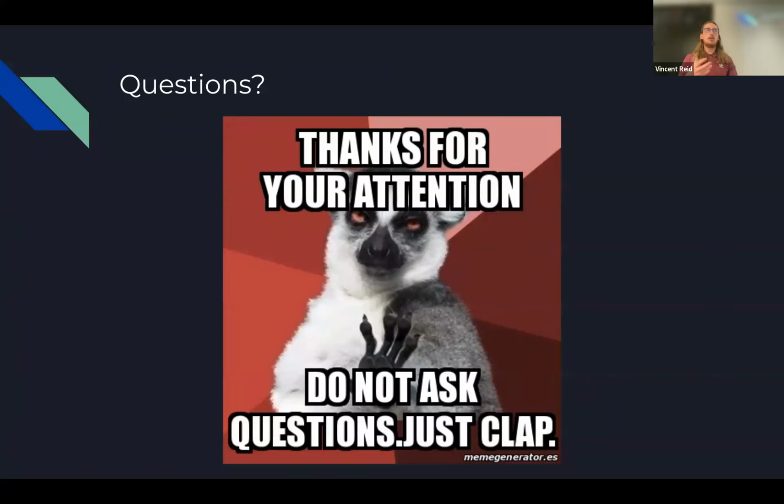I think it does depend on your space, but knowing how many items you need to cover should be part of your estimation in the first place when it comes to delivering the whole feature in a perfect world with integration all working the first time, and then adding that to the end of your project. That's kind of the rough tabletop math we do. I don't think there's a perfect science when it comes to how much time you need, but ultimately looking at your original sizing, cutting out that now you can't do QA or BA verification, and then adding that bit onto the end of your project is kind of the methodology we'd use.